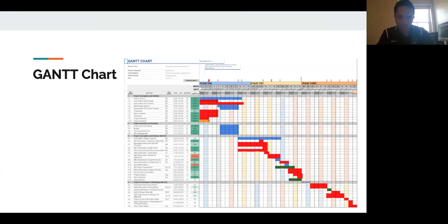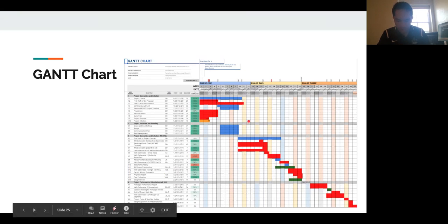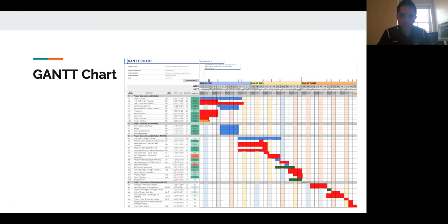From here, you can see on this Gantt chart we had 3 phases: phase 1, phase 2, and phase 3. They all had an equal amount of weeks in them, which is 12. Within those 12 weeks, we broke them up into how the project was to be coerced or coaxed. In the beginning, it's very document heavy, very research intensive, brainstorming intensive. Then phase 2 is very much, how do we get these ideas to a prototype? And then phase 3 is when we're ready and setting it for presentation or delivering it to the customer.